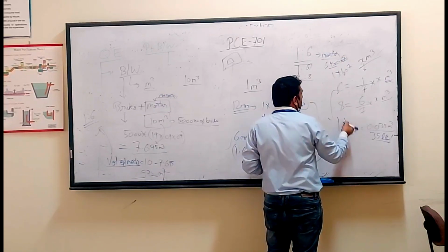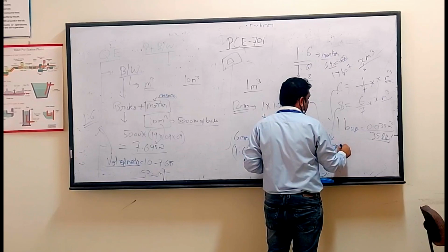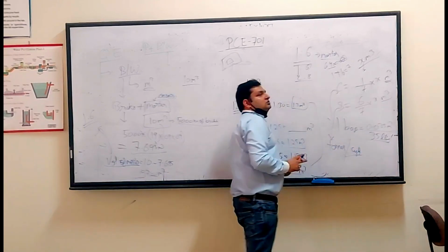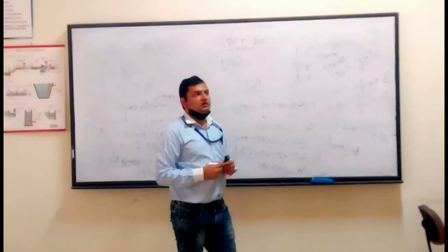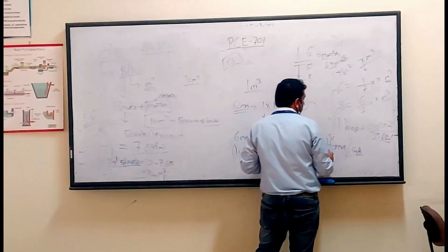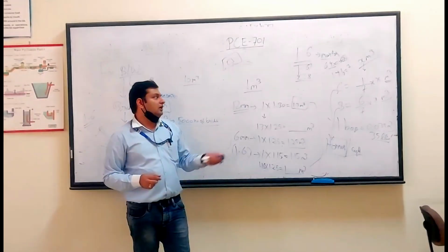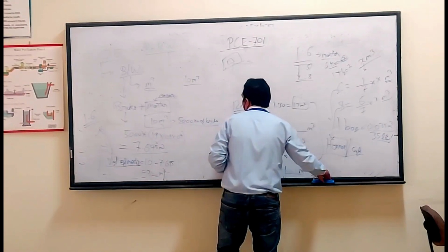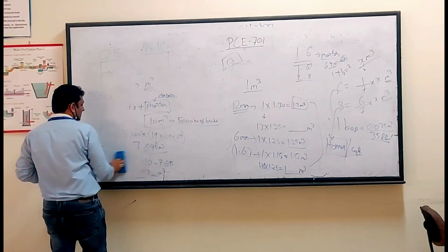Fine. For sand, you generally order either in tonnage, that is rupees per ton, or in cubic feet. These are the two measurement units you use. So either convert the cubic meter into cubic feet, or convert it into tons using the density of the sand. You can leave it in cubic meter also, so sand can be ordered in that unit. This will be the second portion of your write-up calculations for wet work quantity and plastering quantity.